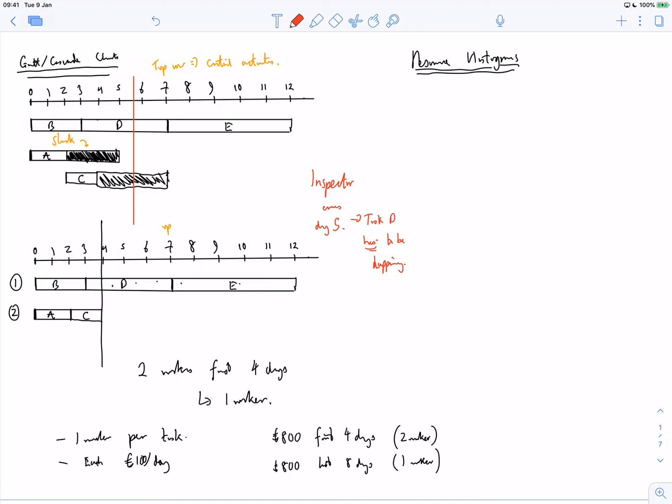I believe this thing is the Gantt chart, and this thing up here is the Cascade. The reason it's called the Cascade is because the tasks kind of cascade down, and it's really important. The critical paths are the top ones. It's the complete top row. There's no slack. I've said that already. There might be 2 parallel critical paths, and in that case it doesn't matter if you have one on top of the other, as long as you've got a complete row and then another complete row.